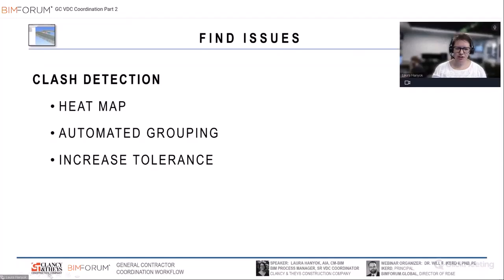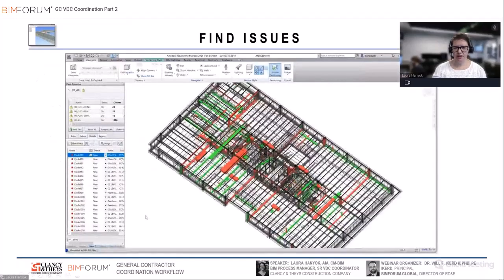So to start, I might be using Navis, like in this case, where this is actually the office building in which we work now, that we coordinated a couple years ago for the core and shell. So I can do an initial snapshot of just clashing everything, all systems against all systems, and really see where we're going to be focusing for the next couple months.